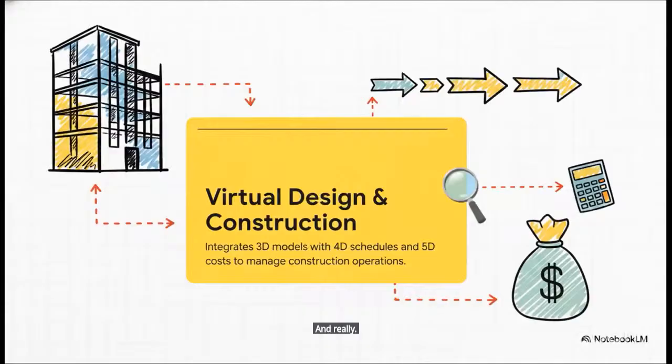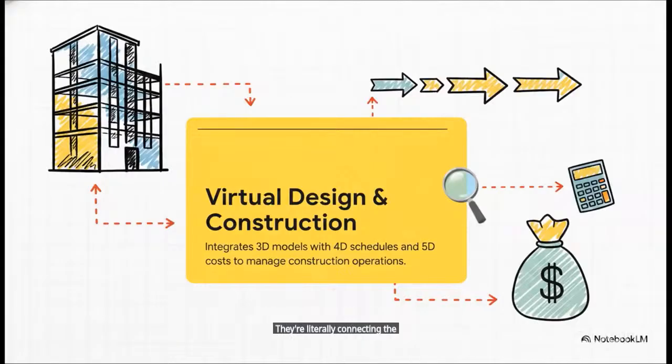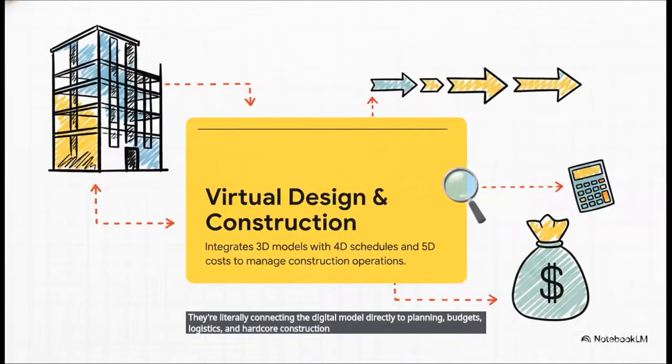And really, that brings us to true virtual design and construction. You see, a VDC manager doesn't just use BIM as a drafting tool. They use it as the ultimate management platform. They move beyond standard 3D geometry to integrate 4D, which represents those complex project schedules, and 5D, which brings in the actual real-world costs of the building. They're literally connecting the digital model directly to planning, budgets, logistics, and hardcore construction operations.